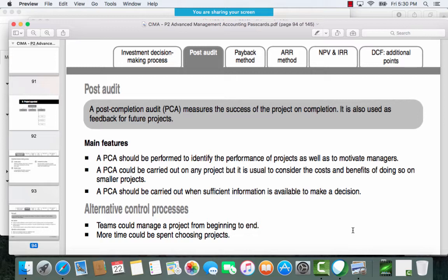So when Accenture came to do a study on this, one of the key things they found was, you guys are not talking, have a project review board which will basically mandate and review projects from across the organization, because they found so many duplicate projects, right? So these are again good examples that you can come up with.